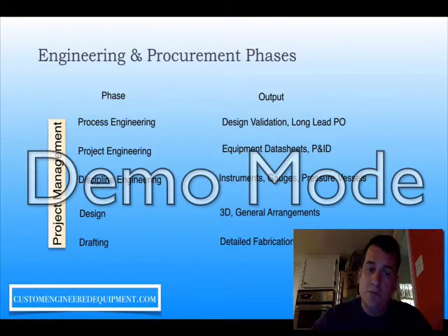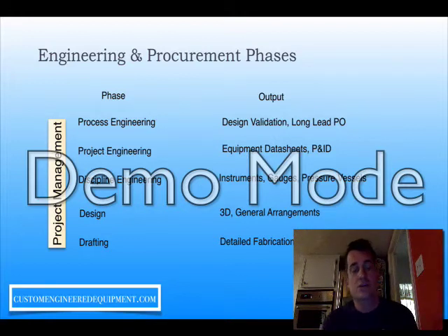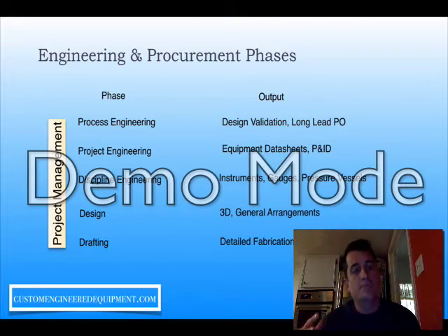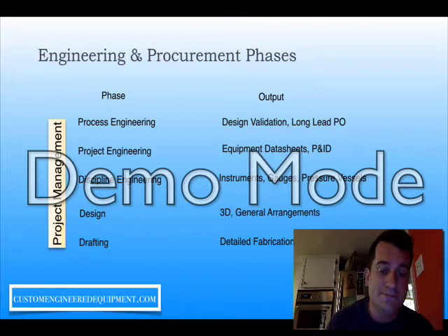From there, if applicable, we'll enter discipline engineering, which is the instrumentation, controls. Sometimes you may see pressure vessels, maybe detailed structural skid design. So any specialized engineering will occur after the project engineering phase. There is some overlap during these phases, so that's something to keep in mind.